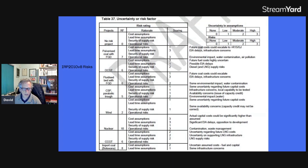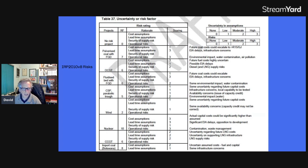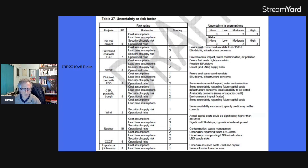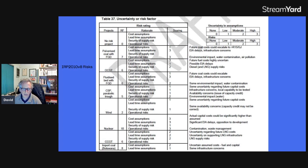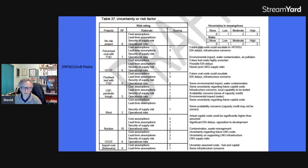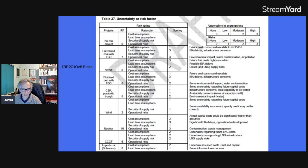Cost assumptions, three. We don't know what it's going to cost. Lead time, three. We don't know how long it's going to take. Security of supply, well, we can get uranium. But of course, we know that there's potential problems with uranium and uranium enrichment and so on. Operational risks, well, gee, what happens if there's a meltdown? We're giving it a three. And here you can see the notes. Actual capital costs could be significantly higher than assumed. Significant EIA delays, opposition to development. So those are the problems that, you know, if you're going to build a nuclear power station, you've got EIAs. You've got environmental impacts. You've got to check them all. Got to make sure things are okay. How are you going to look after the power station for 1,000 years after it's installed?